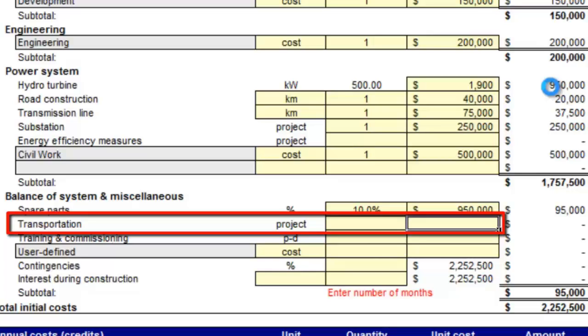In very isolated and remote areas, bulk shipments might be received once a year, and logistical control is extremely important here. Shipping costs should be obtained from a shipping agent when the scope of the project, equipment and materials are determined. Note that the transportation costs might also be included in the equipment cost entered previously.